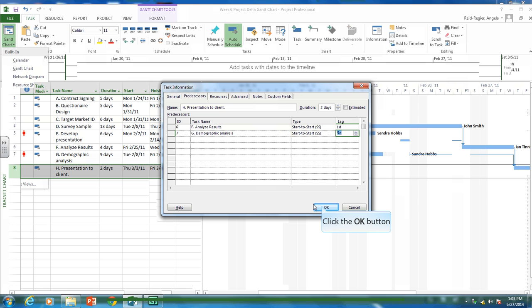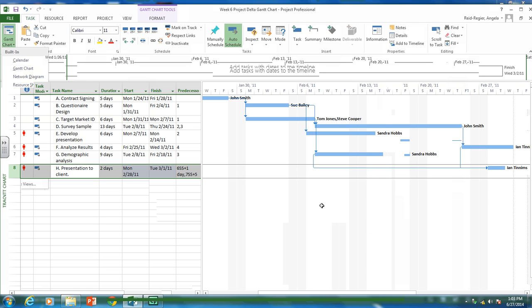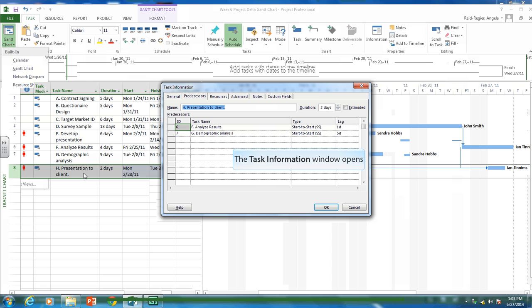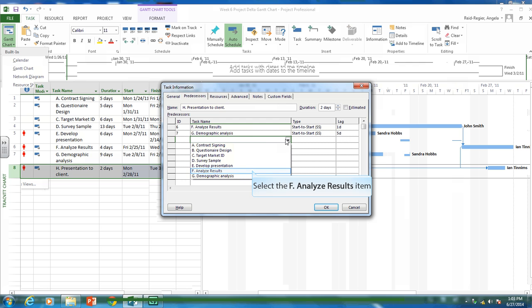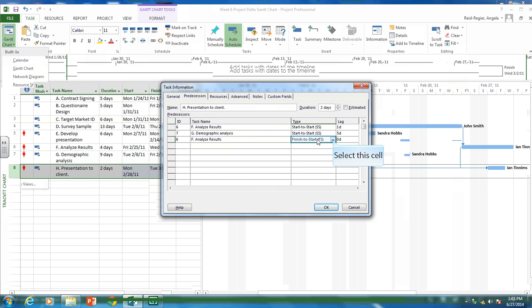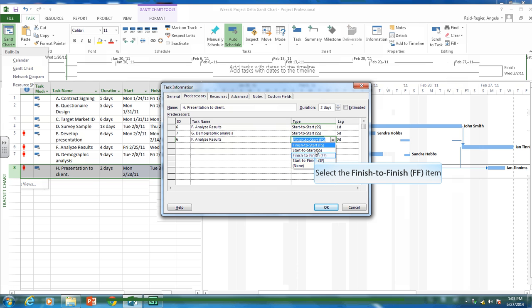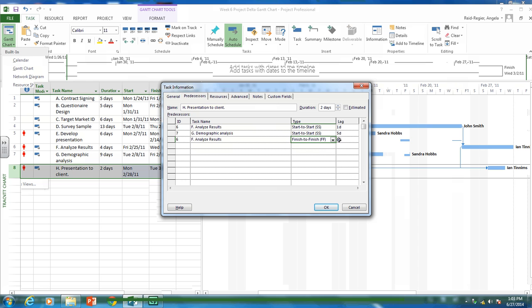So let's change those. And as you can see, we've now moved this presentation. So that doesn't make a lot of sense that we'll be done doing the presentation before the results are being analyzed. So maybe we can change this then. Let's add analyzing results again. And let's change this to a finish to finish. So we can't finish doing our presentation until the results are being analyzed. And let's put, it's about one day, we need at least one day after the results are analyzed to finish doing our presentation.